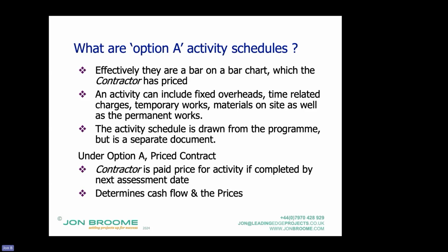Now, that's a bit dangerous for a contractor, because if a month-long activity overruns by a month, they've got to finance it for a month. So many contractors, especially as the contract has quite a low threshold for rejigging your activity schedule, as the time approaches, will be looking to break it down to, say, week-long activities, which they can monitor on a weekly basis to say, have I completed it?